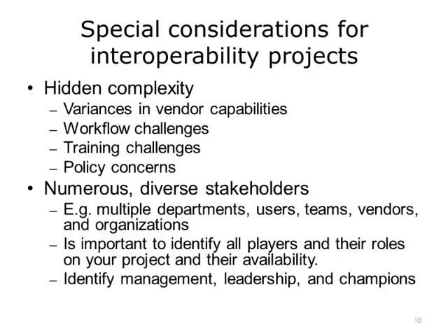Secondly, such projects involve numerous and diverse stakeholders. Stakeholders can include multiple departments, users, teams, vendors, and organizations. The team working on interoperability projects often does not follow typical departmental boundaries. For lab orders and results interoperability implementation, it might include clinician representation, EHR/IT representation for the physician practice, EHR vendor representation, laboratory clinical staff, laboratory IT representation, laboratory information system vendor representation, and interface engine representation.